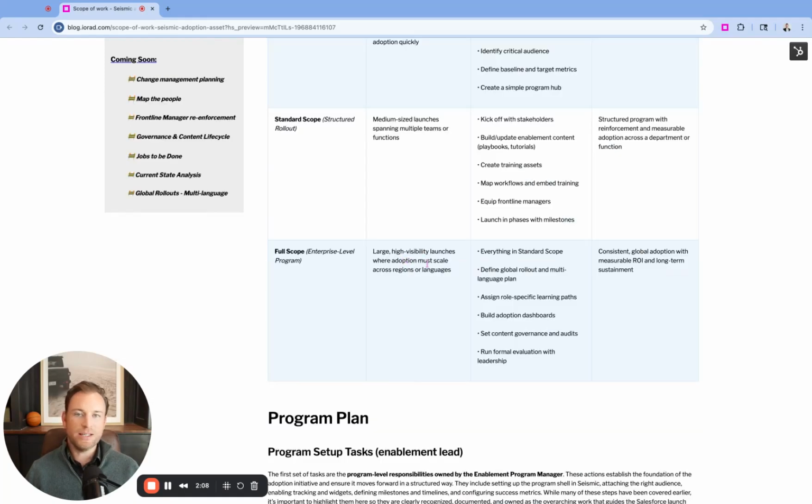Another best practice is, even if you have to start at a larger scope than you're ready for, break it into components. If you can do it by job title or by phasing or rollout, it's really helpful. So for example, if you're rolling out a brand new Salesforce implementation, you don't want to roll this out as one adoption program, right? We want to break this into segments. Can you break this down by job title, by segment, by module? A way to make it simpler to manage as well.